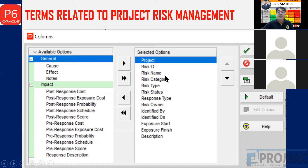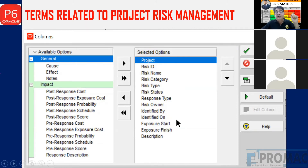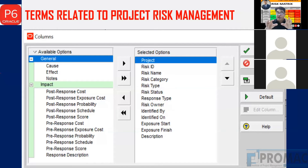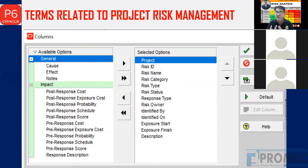The risk register attributes include: Risk ID, risk name, risk category, risk type, risk status, response type, and risk owner — who will take care of it when it occurs, who identified the risk, the date identified, and the risk exposure start and end dates. After that, we calculate pre-response probability, pre-response impact, and post-response probability and post-response impact. Normally all this detailed analysis is done for high-priority risks only — we cannot do it for 200 risks, but we can select the top 10 or top 20, depending on project size. The rest we accept as is.